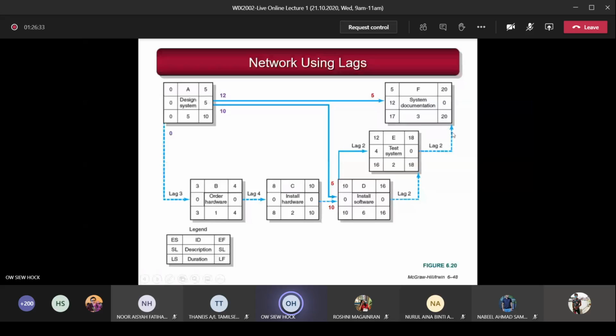Next, okay, come back here. Now, this one comes back here, okay? This one is 20, so you minus 2 becomes 18. 18 minus 2 becomes 16, okay? So remember this one, you see, the moment you started, this one started. So this one 16 minus 2 is supposed to be 14, but you take this one, come back here first. 18 brought here minus 2 is 16. 16 minus 6 is 10. So you take the smallest, you understand?